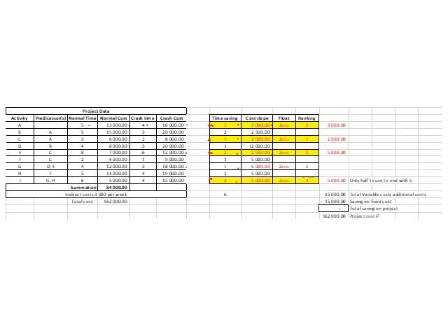So what you do is work out your cost slope for all of the items, and you rank them. Although you only have to do it for your critical path items, because it's not necessary to do the others. I just included it here to give you an idea. All the ones marked in red, writing, or 0 here are our critical path items.